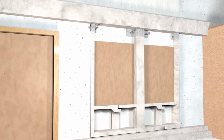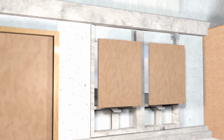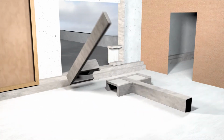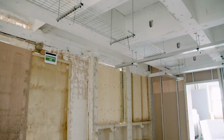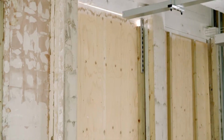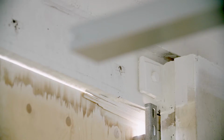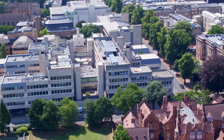Asbestech were asked to design a safe working method to remove the spandrel panels, none of which had ever been removed before. These panels have previously been stripped of sprayed asbestos insulation, which has resulted in the need to examine whether asbestos contamination is present, both under the panels and also behind the cleated bolts at the top of the panel, prior to the planned major works.